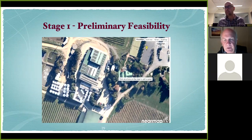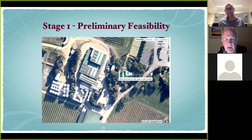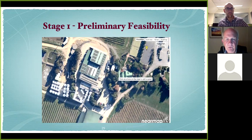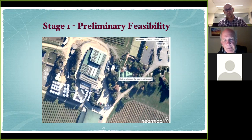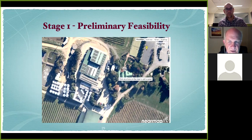The Nearmap image shown is of a winery in the Yarra Valley. In augmented or virtual reality, they can place panels on the roof to look at shadowing. Nearmap is a series of aerial flights undertaken about every three to six months. From this they can say, for example, 'we can put a hundred panels on this roof.' Then they use the Sunulator calculator — a series of eight pages where you plug in parameters and look at what happens if you put 20, 40, or 60 kilowatts on the roof and assess return on investment and self-consumption.